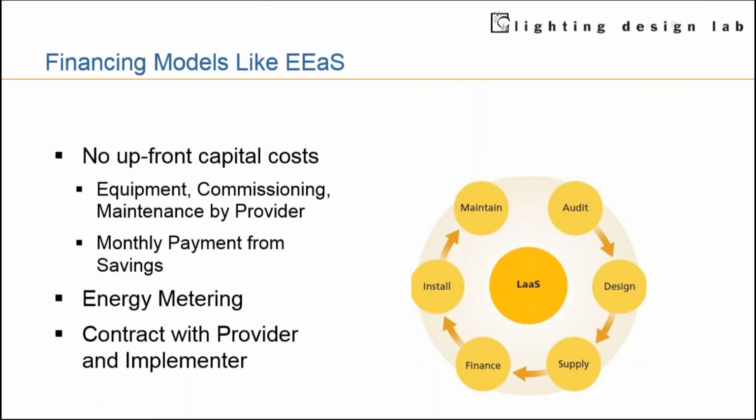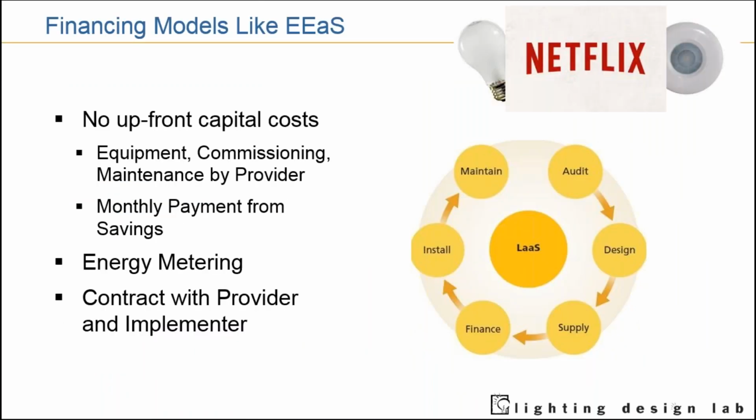And once you have the retrofit project installed, you will realize a lot more energy savings. From those savings, a portion goes as the subscription payment to the provider who ultimately financed the project. It ensures that owners remain cash flow positive and can reduce those worries of, oh, the upfront costs are too high, or the simple payback is going to be like 10 years. It's never going to happen. So there are a lot of ways. If you have stakeholders, make them aware of additional financing models, or just aware that we should invest correctly today to get our benefits for the time to come.